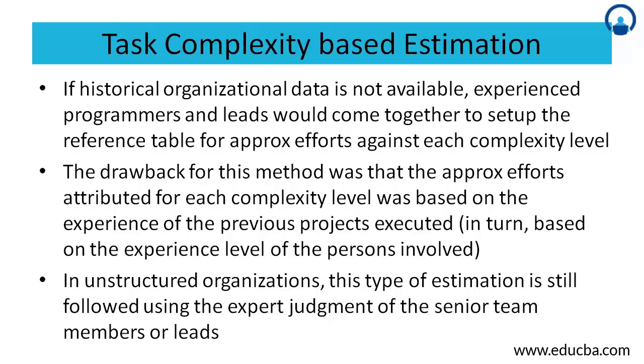In maintenance projects and mainframe projects, this type of estimation tends to be used. Although they might call it by a different name, essentially they break down the functionality and sub-functionality into granular level, and then assign small, medium, complex, or very complex structure, and using expert judgment or experiences from past projects or similar technologies, give a number, basically effort days, and then sum it up and come to a total effort.